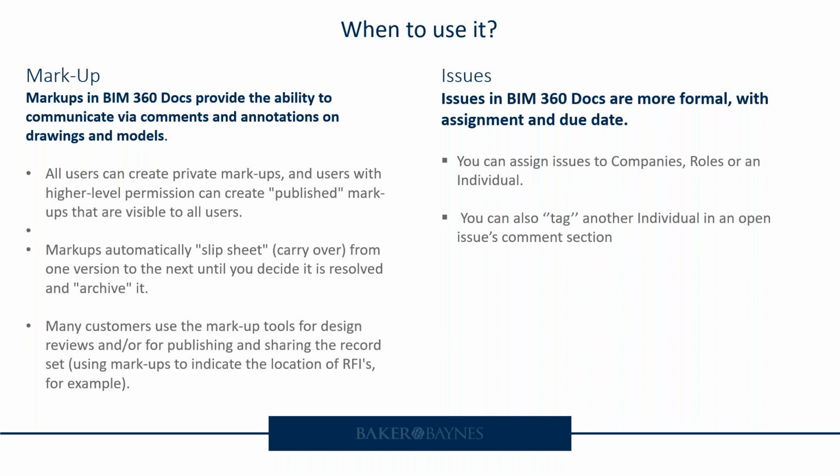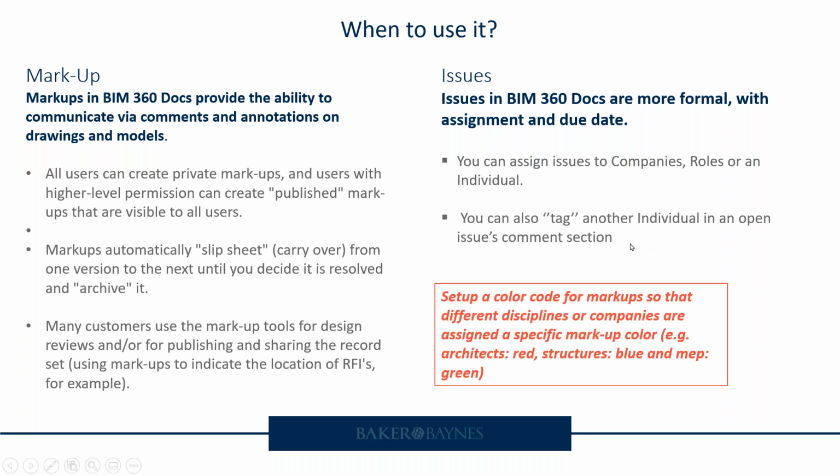For issues, again, the role thing comes into play. You can assign an issue to a company, to a role, or to an individual. You can only assign it to one individual. So I usually suggest, assign it to a role. If you are assigning an issue, assign that issue to the architect or the architectural technologist, or whatever other role you've created. If you do want to, what I refer to as CC someone into an issue, you can go and tag them in the comment section.